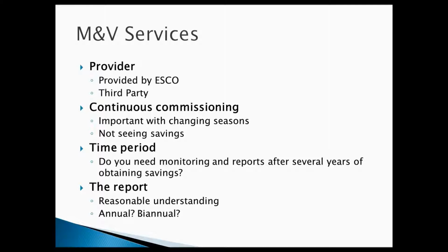Very long and confusing name, but this is where you possibly measure certain factors that you can isolate from the rest of the building and then stipulate other parameters. This is often done in the case of lighting, where you could measure the power draw, for example, but things like the hours of operation would be stipulated.